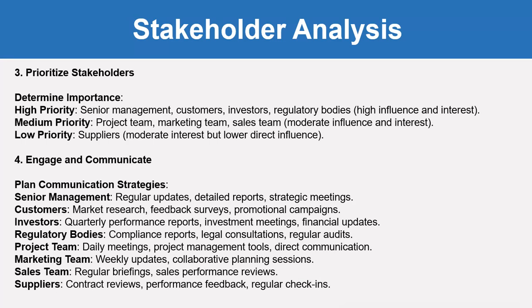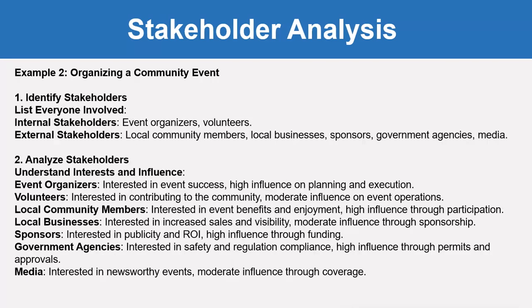Project teams need daily meetings, project management tools and direct communication. The marketing team needs weekly updates and collaborative planning sessions. Sales teams need regular briefings and sales performance reviews. Suppliers need contract reviews, performance feedback and regular check-ins. Now we can talk about another example, organizing a community event.